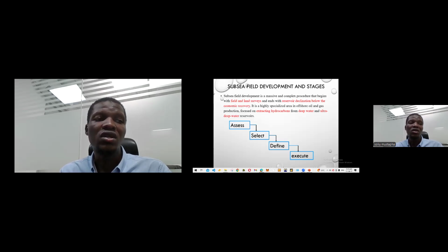Then we now move to the definition phase, which is also known as project specification, where we do our front-end engineering design, FEED, we do the cost, we do the schedule, and also the execution plan. After we are done with our definition phase, we now move to the execution phase, where we do our detailed design and construction. This is the stage where we procure our long lead items, we do our installations, we select our materials, we do fabrication, and we commission before we put the facility into production.